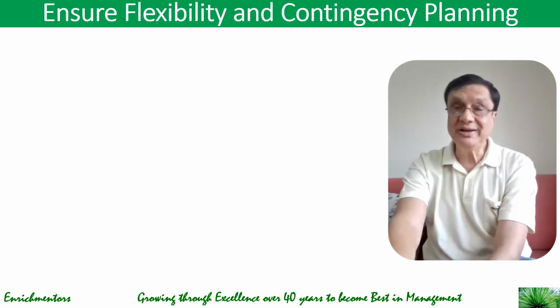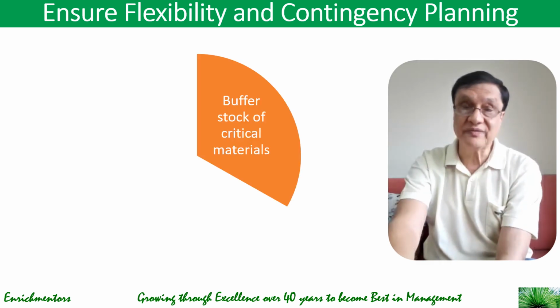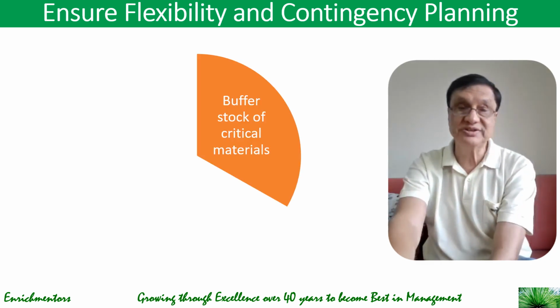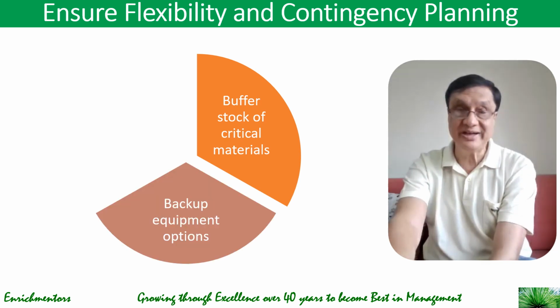Ensure flexibility in contingency planning, which is an important piece in efficiently using resources. Maintain a buffer stock of critical materials to handle unforeseen delays. Have backup equipment options in case of breakdowns, and cross-train workers to cover unexpected absenteeism or skill shortages.